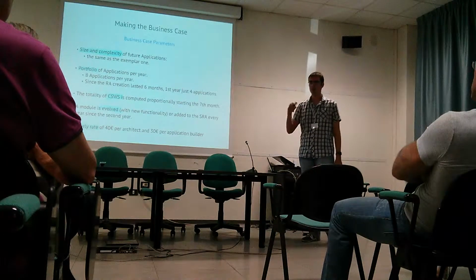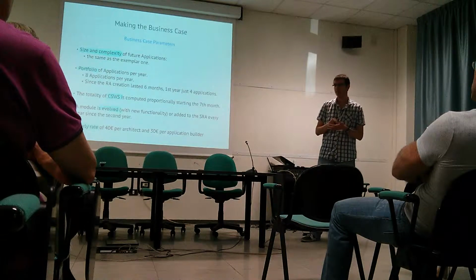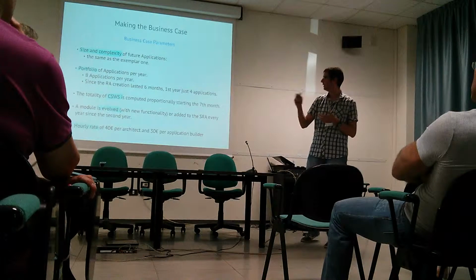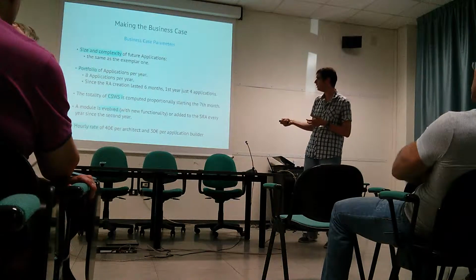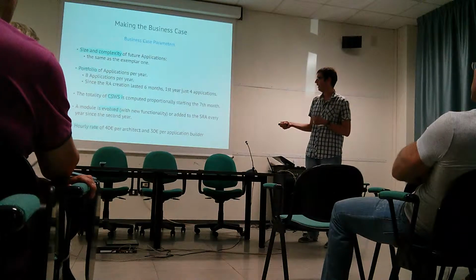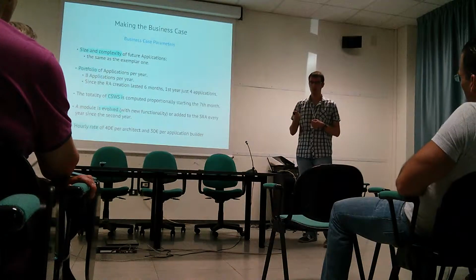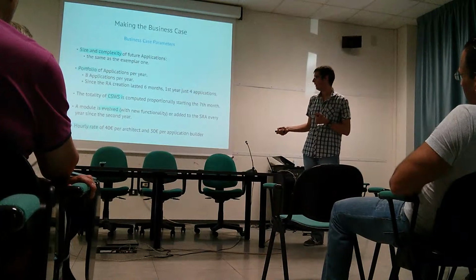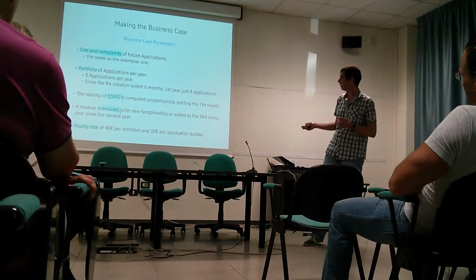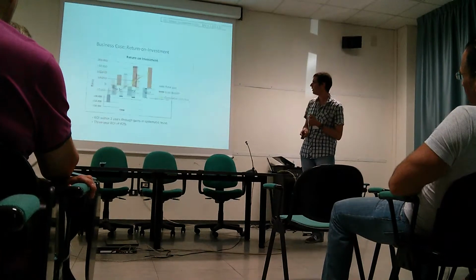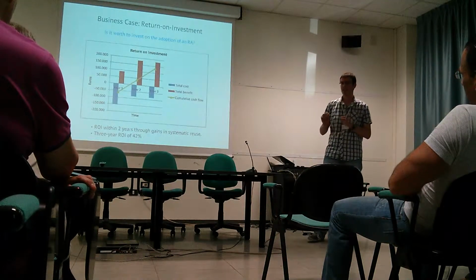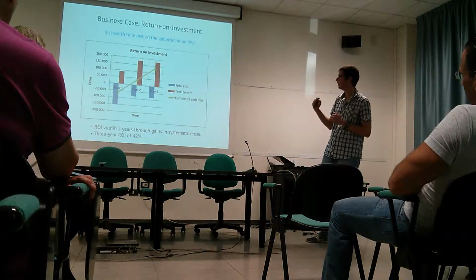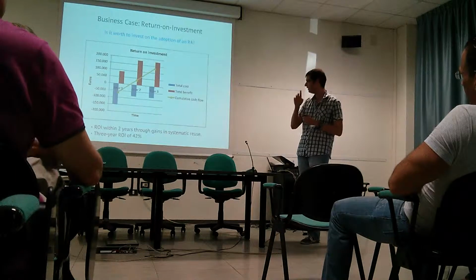Then the maintenance cost, the future ones, we have computed proportionally with the data that we have with existing maintenance cost. Then they are going to create a new module, a new evolved module every year in the software reference architecture, and there is only one rate for employees. So with this we created 2 scenarios. The first one is if it's worth it to invest in the option of a software reference architecture.